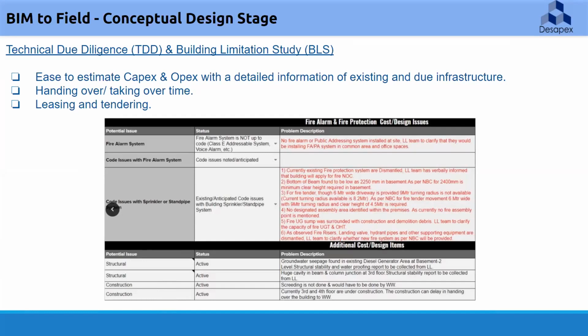With the help of due diligence report, the handing over and taking over time can be analyzed precisely, as we know what is due and what is the lead time for procurement of the due infrastructure. The final verdict of the service will help our clients to decide to proceed with leasing or tendering, negotiation, or walk away from the project.